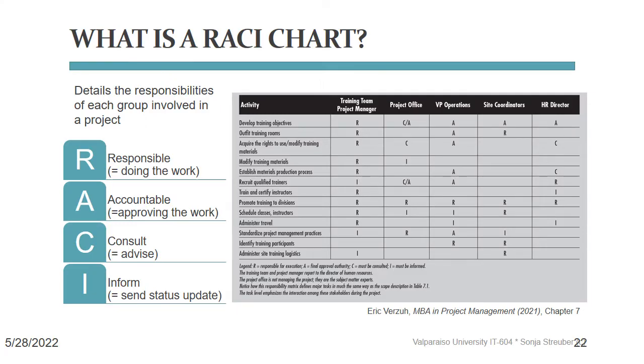A charter answers many questions about the project, including the purpose, scope, deliverables, and chain of command. There is, however, a need for another document that precisely details the responsibilities of each group involved in a project. It is known variously as a Responsibility Assignment Matrix, or RAM, RACI, which is a Responsible, Accountable, Consulted, and Informed chart, or simply a Responsibility Matrix. The importance of this document is growing as companies re-engineer themselves and form partnerships and virtual companies.